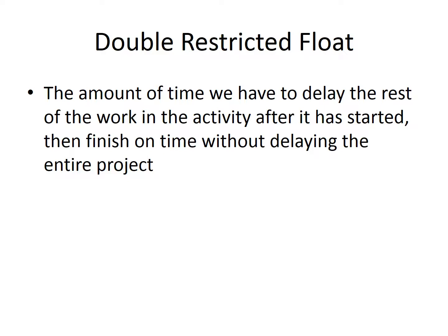So this is probably a little bit harder to wrap your head around than just doing a simple critical path method. When we were doing the critical path, the whole activity was critical. If any part of that activity was critical, the whole activity is critical. Same thing with a lot of your software programs. Primavera will schedule things that way, as will Asta Powerproject. If one part of the activity is critical, then the whole sequence becomes critical.